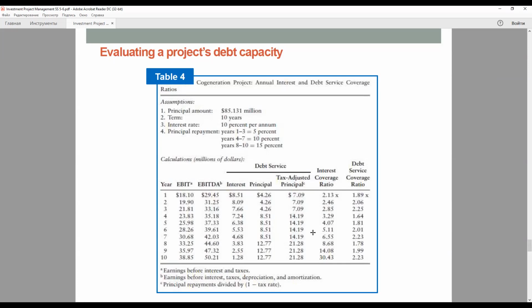The project company could obtain protection against a possible increase in interest rates by entering into a deferred swap contract under which the project company would agree to swap interest payment obligations with the counterparty to the contract beginning as of the completion of the project construction.